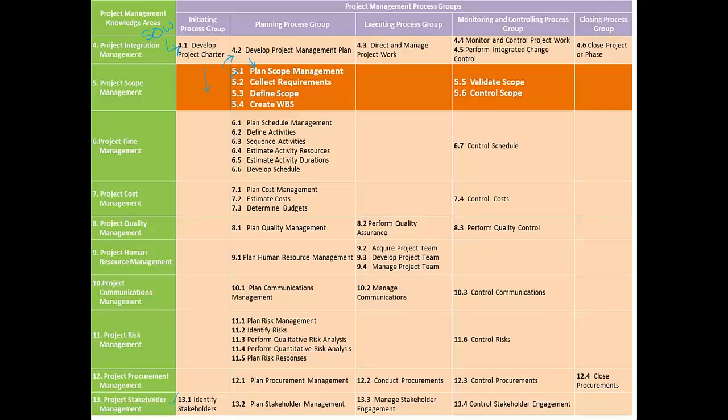Once we have created the scope management plan, our next step is to collect requirements from these stakeholders. Once we have collected all the requirements, we validate those requirements against the project charter and come up with a detailed project scope statement. This is done as part of the define scope process.